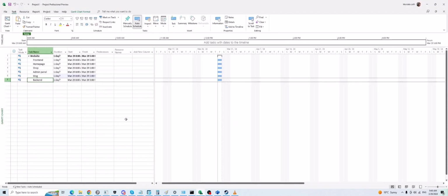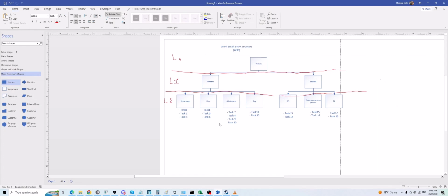It's not like you just open the software and start the data entry. The data you put inside of Microsoft Project, you have to do something before reaching this step. And creating the work breakdown structure and identifying required tasks is basically that step. This step happens outside of the software, requires project management knowledge, requires the project management process.